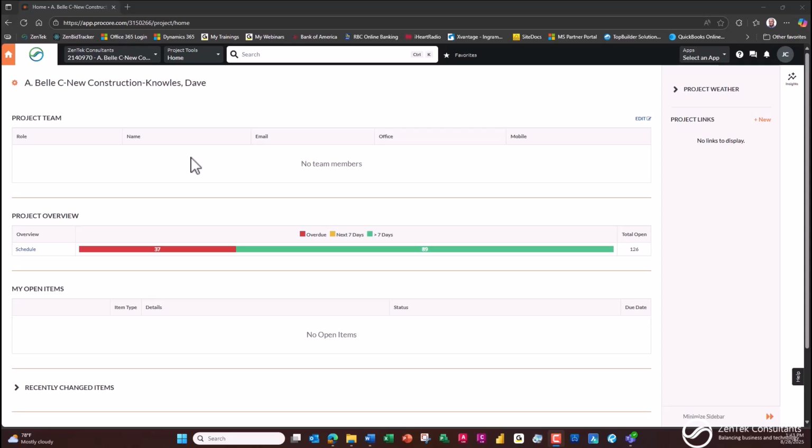The problem we have is collaboration and making sure that all the different stakeholders on your job have the ability to look at, work from, build from, and order from the most current version of your construction documentation, both drawings and specifications. If that's not centralized in one location, you wind up with people putting things up from something that was two revisions back, so it's in the wrong place and has to be ripped out, and there are contract disputes and lawyers involved and a loss of time and money and delays. It's a horror we all face every single day.